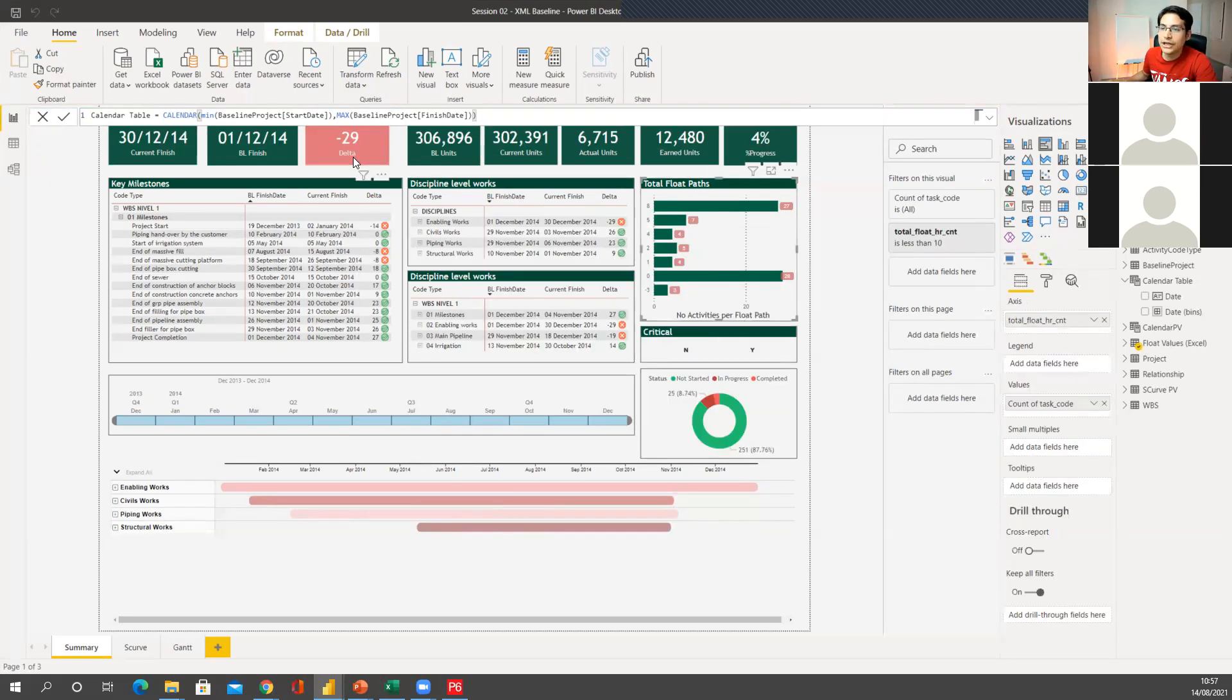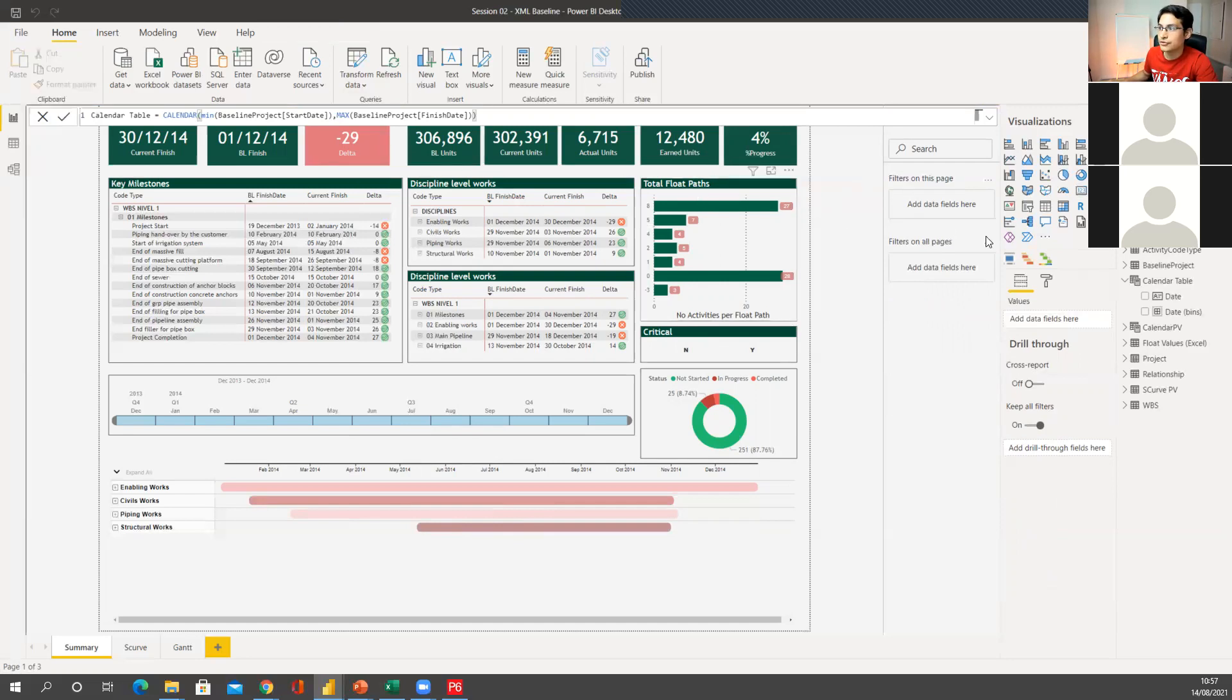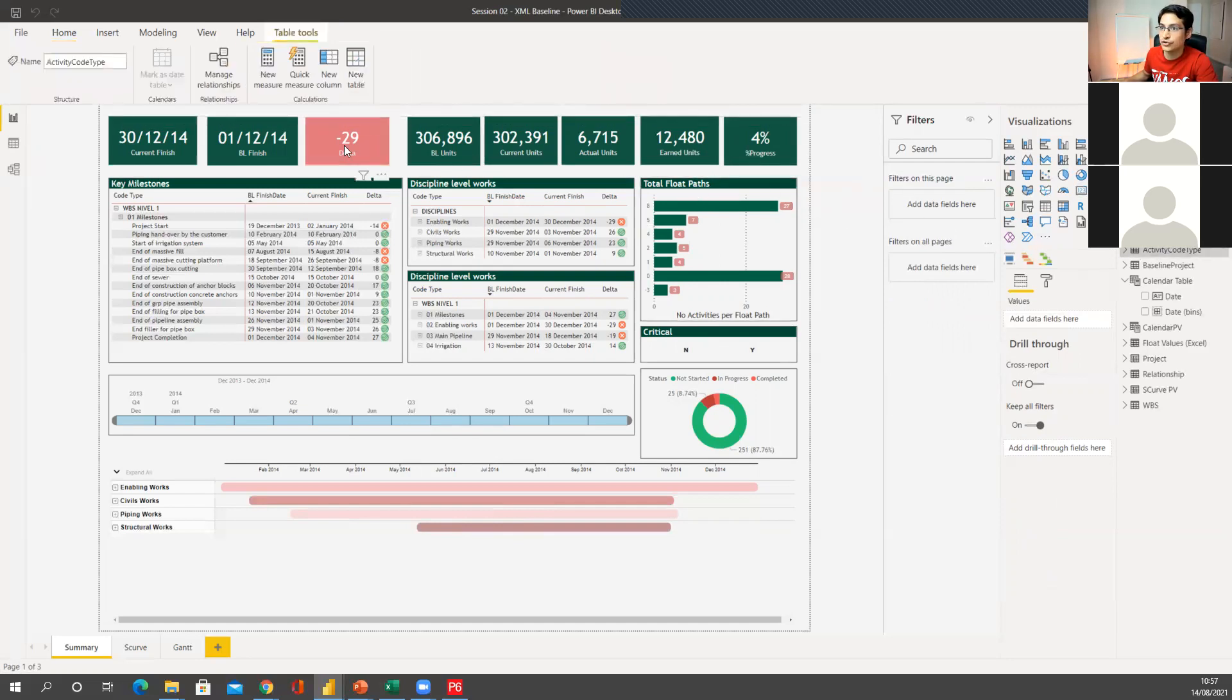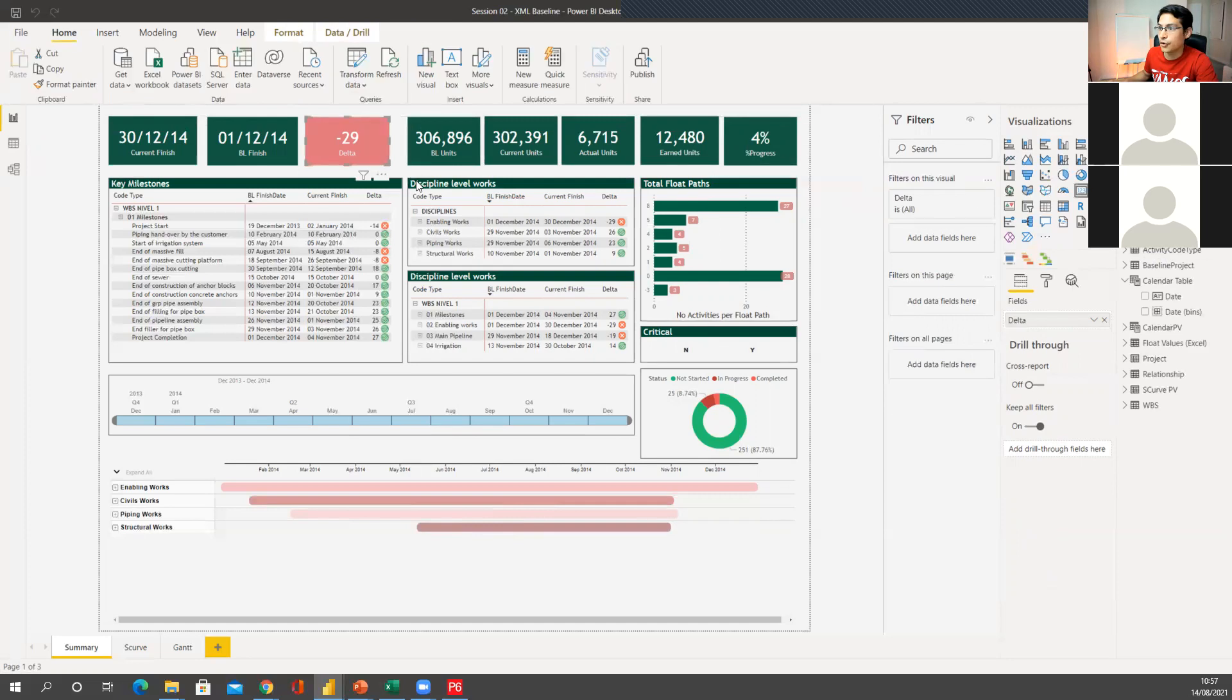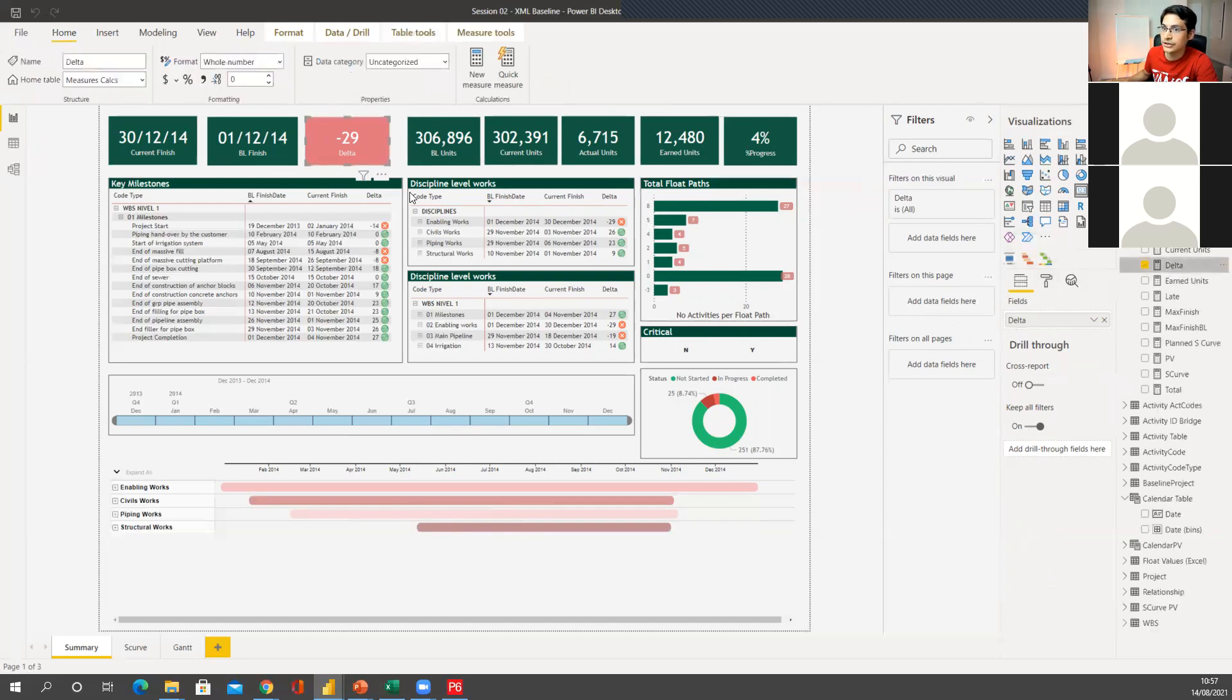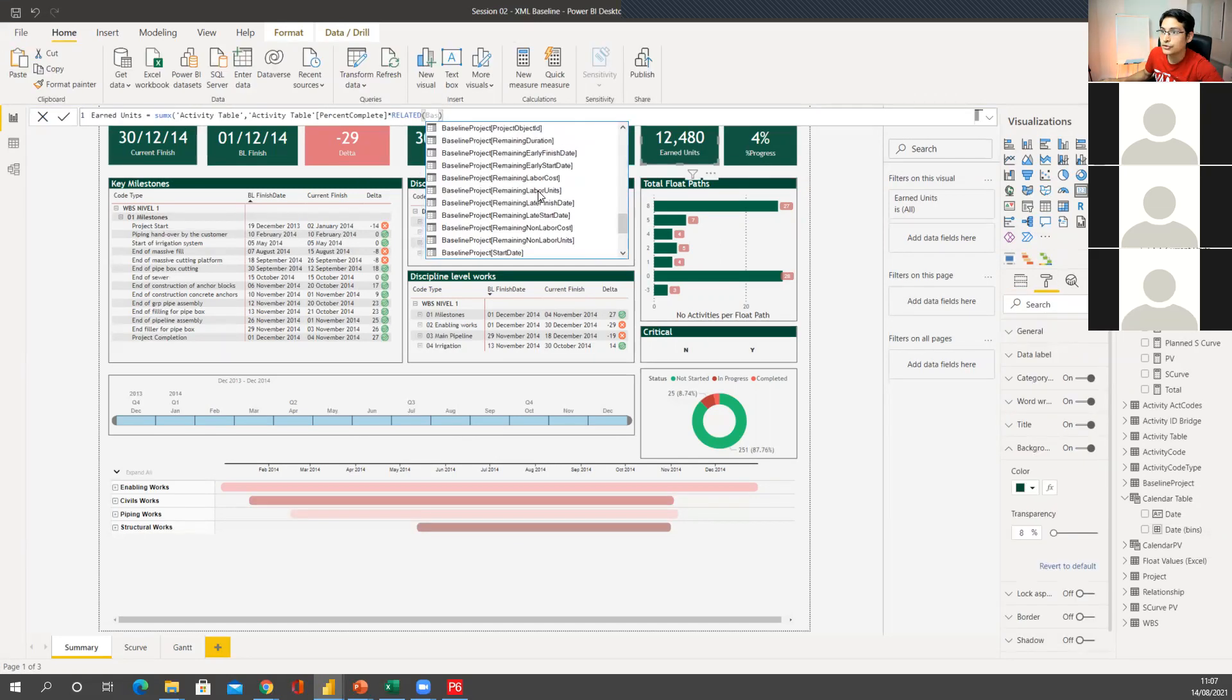So everything is formulated here so that the refresh has finished. And you'll see that now what was green became red in here. The reason is because this is kind of formulated. So the cards are really good to put formulas on them. This is just showing a delta. This is a measure. And it's a delta between the baseline finish and the current finish units.